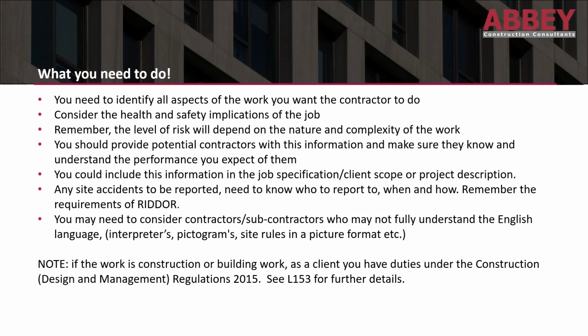One of the sites I'm currently working on just inside the centre of London, everybody working on that site, English is not their first language. Out of 60 people on site, only 2 can speak English, and we use those as the interpreters. We tend to give out pictorial information and then get the interpreters to explain the meanings behind them, documents are signed, and then we go and watch what they do on site to make sure that they are working to the requirements set out within them, pictograms, etc. So it can work as long as it's communicated effectively.